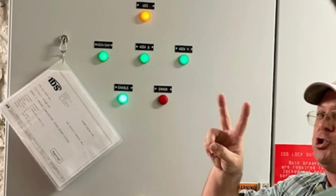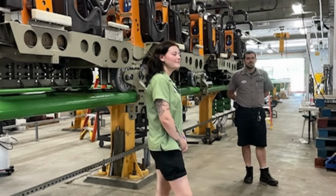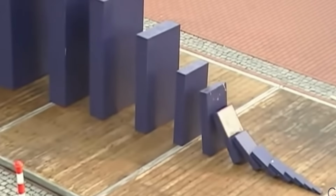The other thing is it becomes a timing domino effect. So you always plan to follow the schedule as is. Just like we're going to do A, B, C, D, E, F, G, and you're going to go through and do all those things. But the major problem with that is that if project number 1 falls behind by a week, it's like, okay, it's a week, we can catch that up. Project number 2 might fall behind a little bit, maybe just by a week. But that's cascading off of project number 1, remember. So now project number 2 is 2 weeks behind. And then number 3 might be off by 1 week, but now it's 3 weeks behind. And so on and so forth.